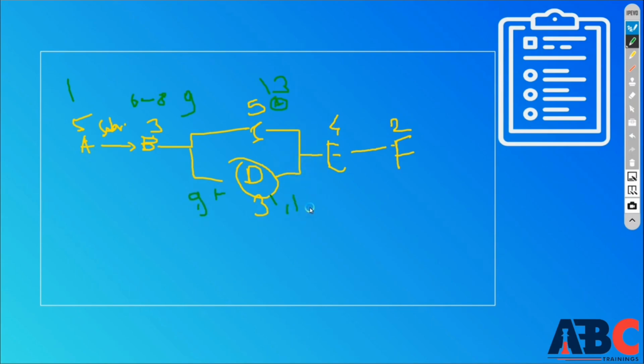But you have 2 days extra gap here, because we are not going to start this till the end. So you get free float here. Free float means you get a gap. You get free days to start the activity late, which doesn't matter to the start or end of the project. So this is one thing that will affect you in your entire project, from which you will know the difference.